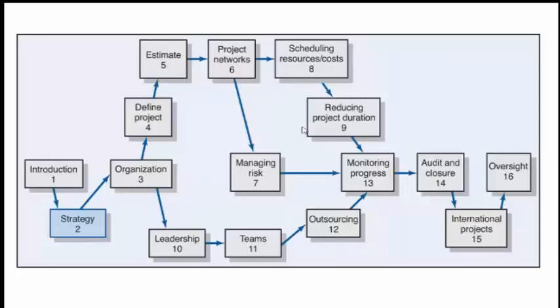You might allocate 20% for design, 10% for analysis, and another 10% for project management and things like that. Then from that allocation you break it down further and do the allocation. So these are the two.